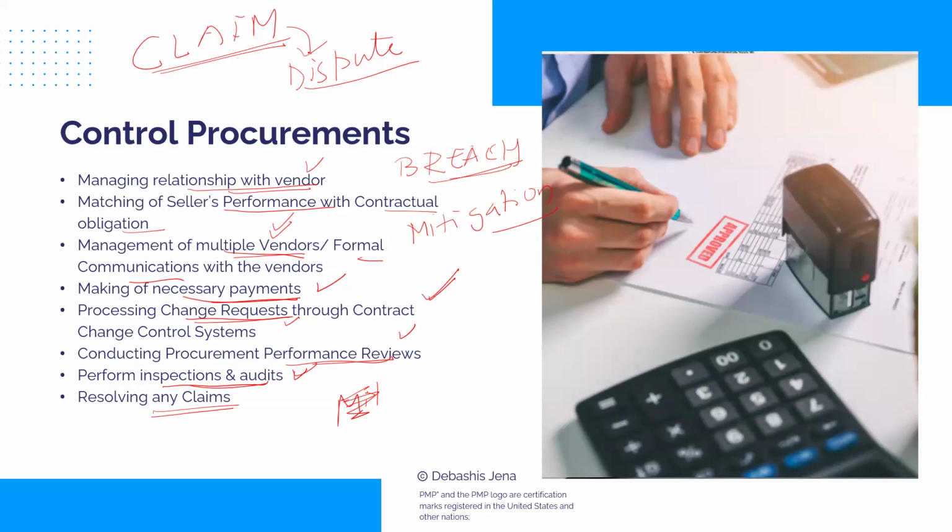I mean, they're not agreeing, they're interpreting the contract differently. The buyer reads it some way, the seller reads it the other way. So they are not able to agree that the deliverable is complete. Buyer says it's not rightly billed, seller says it is. Any kind of disagreement or dispute pertaining to the contract is referred to as claim.